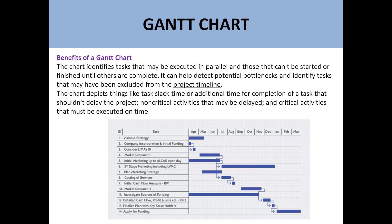It can help detect potential bottlenecks and delays that may have been excluded from the project timelines. The chart depicts things like task slack time. Slack time means an activity which can be delayed but the overall project will not be delayed. Additionally, it shows non-critical activities that may be delayed and critical activities that must be executed on time.